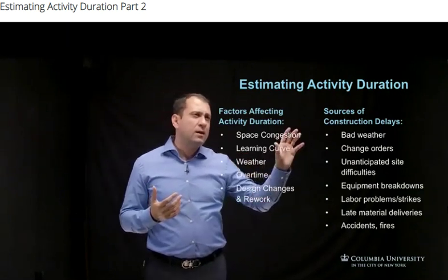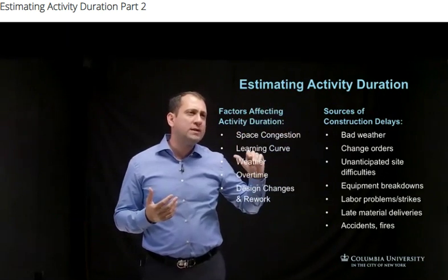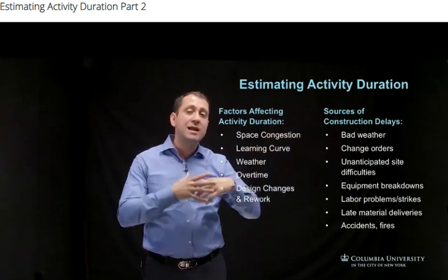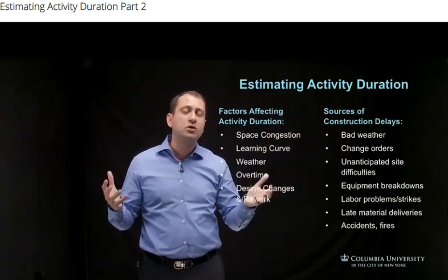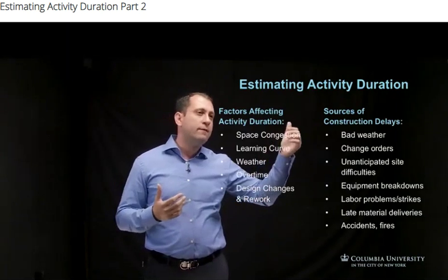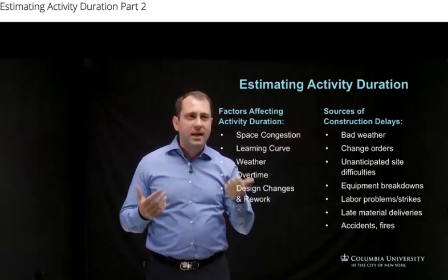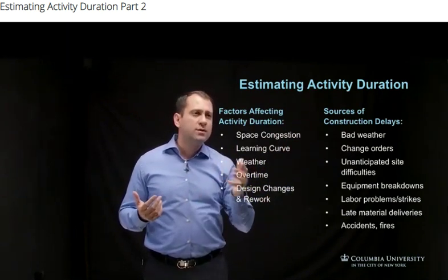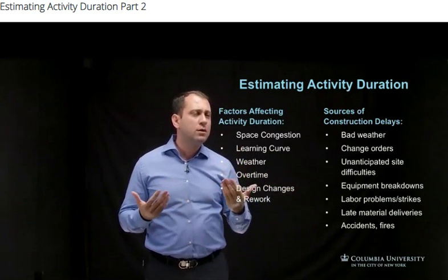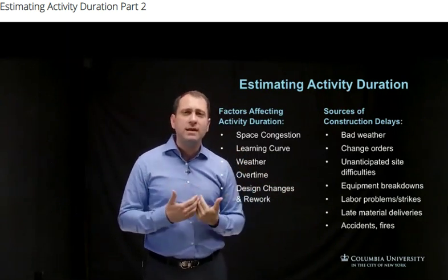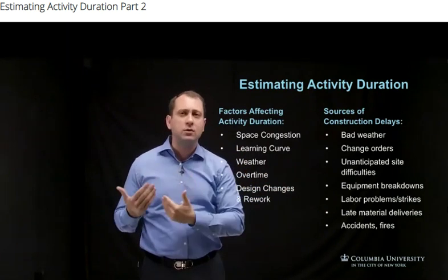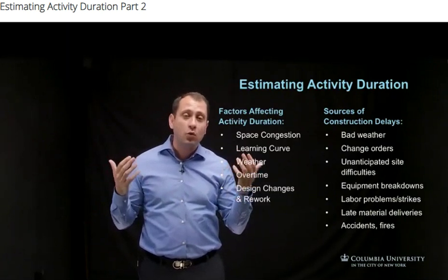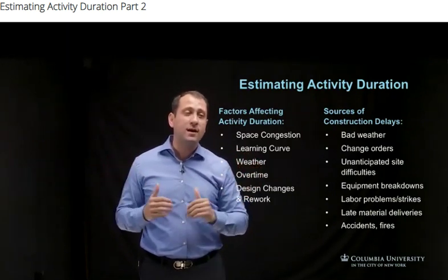Now, in sum, for all that we explained, I want to highlight the common sources of construction delays that can cause the entire project to get delayed. For example, bad weather, which I explained. Change orders, which refer to design changes or rework from the client or from the designer, sometimes cause more delay, and you have idle workers and equipment waiting until that change order comes.